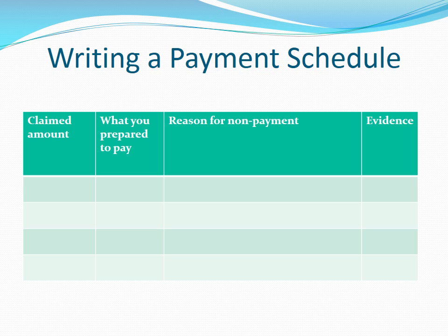It is important to understand the difference, as people often confuse the reason why they are not required to pay and so fail to provide a proper reason or evidence to support their argument. As you are only allowed to raise arguments in adjudication that have been raised in the payment schedule, except in Victoria, if you do not properly understand the basis of your arguments, you may accidentally exclude some vital points. If you follow the table methods, such an occurrence is unlikely.